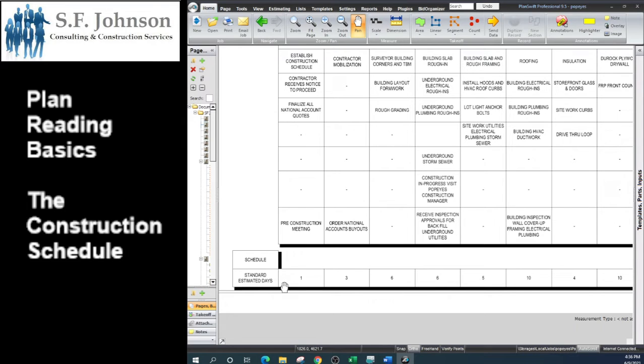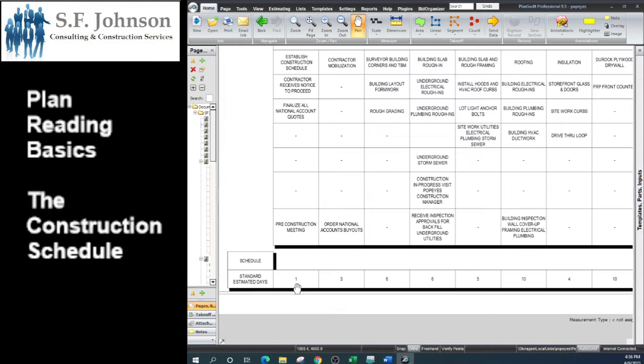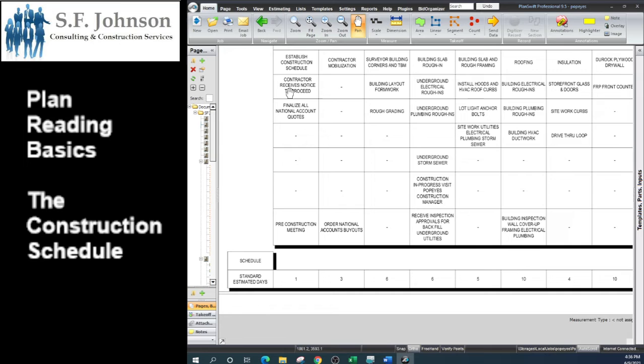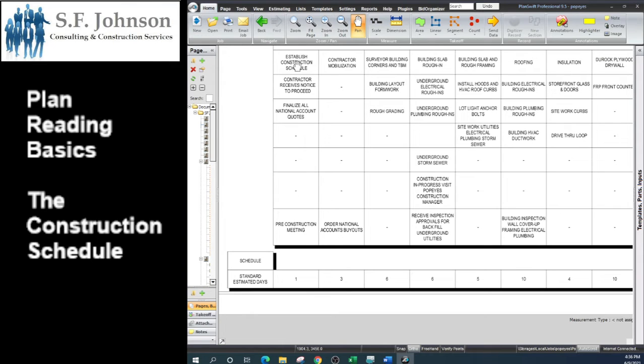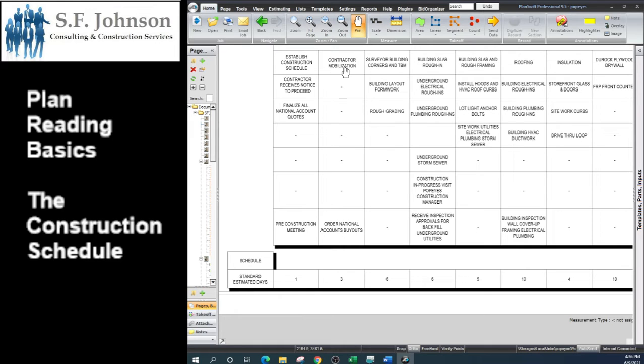It's the amount of time in days that it is going to take them to achieve the full scope of the items in each of the columns. For our first one, they want to take one day to establish the construction schedule: the contractor receives notice to proceed and finalize all national account quotes and pre-construction meeting.